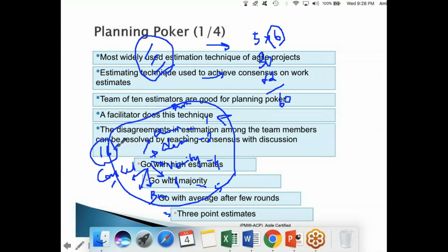So this is taking 16 hours. Add to cart is taking 9 hours, right? Search is taking 15 hours. And reviews is taking 20 hours. So I will take these 4: 16 plus 9 plus 15 plus 20. So for this iteration, I will deliver these 4 features: payment gateway, add to cart, search, and product catalog. The rest of the features I will deliver in the next iteration.